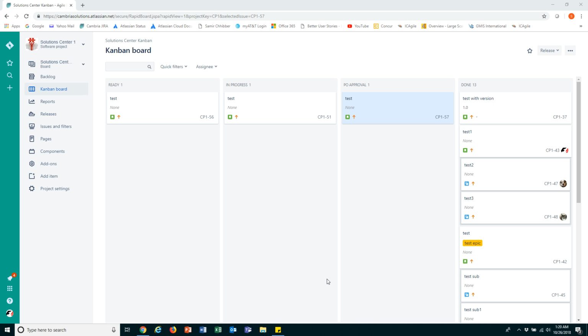And because the stories on the right are more valuable, we need to start working from right to left, which is a very different way of thinking. But to have a good, efficient Kanban system, you really need to work from right to left rather than left to right, which we're normally used to. If you can do that, the board will stay relatively lean, which is what we want. So stop starting work and start finishing work.